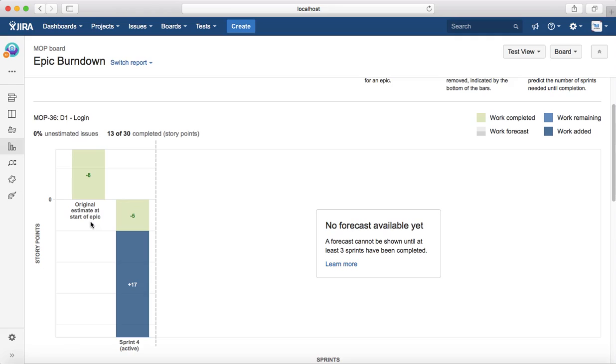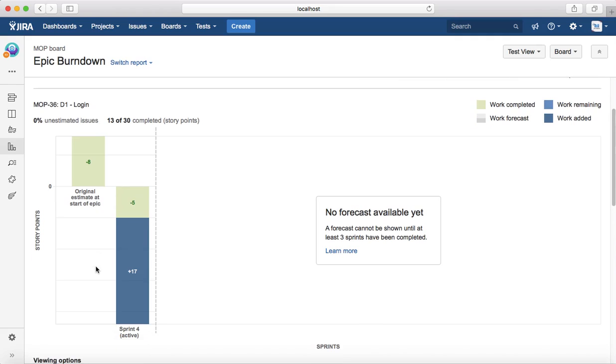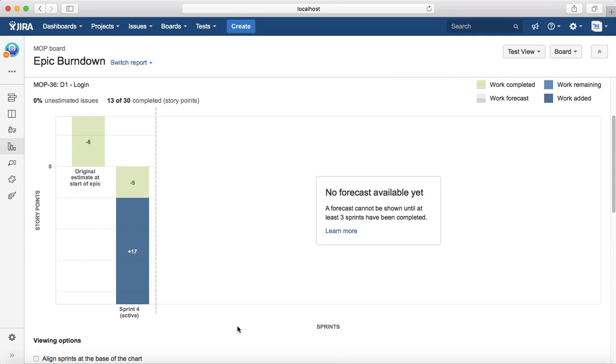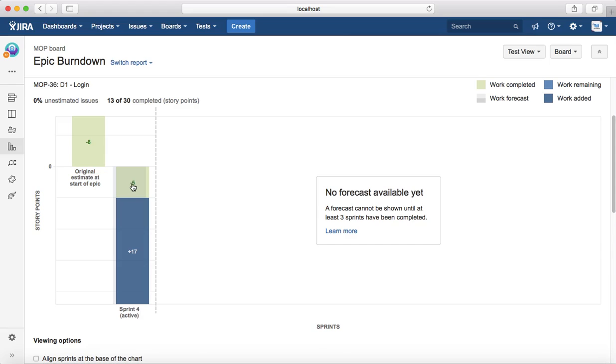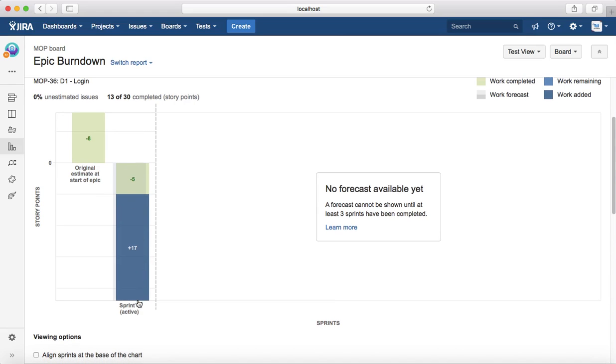Then in the current sprint there was more work added to the epic. You can see 17 plus 5 points were added, out of which 5 points were done. That has been marked as more work completed, and 17 points still need to be completed to mark this epic as done.